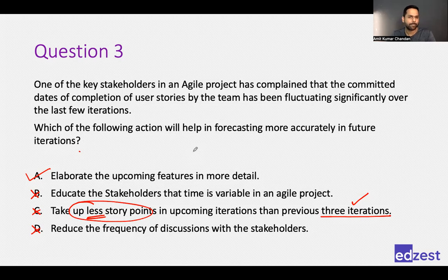But looking at option C, by looking at the number of story points which we already completed, can't we streamline or align to those which were already completed? See, if I am planning 100 story points for each user for each sprint, and somehow my team could only deliver 80 story points, which is an average of the last 3 sprints, let's say, why would I go for 100 story points again in an upcoming sprint? That was my question.